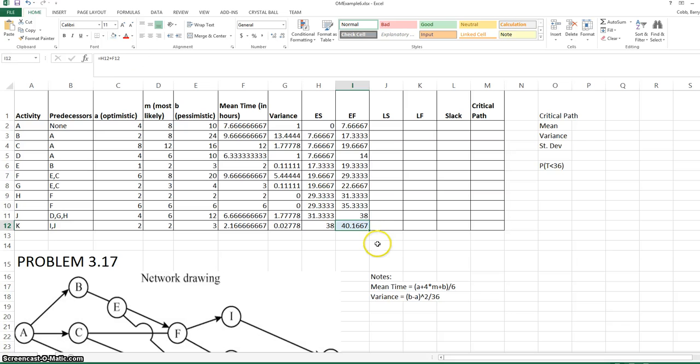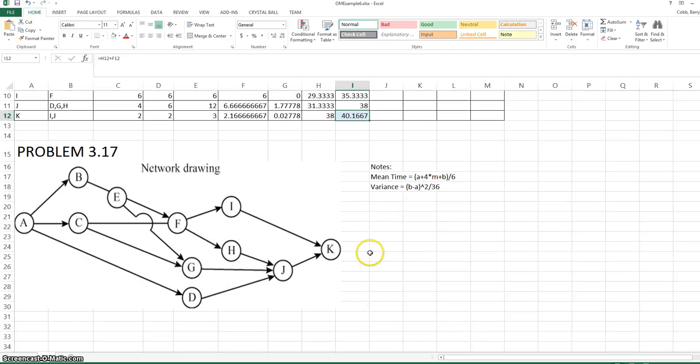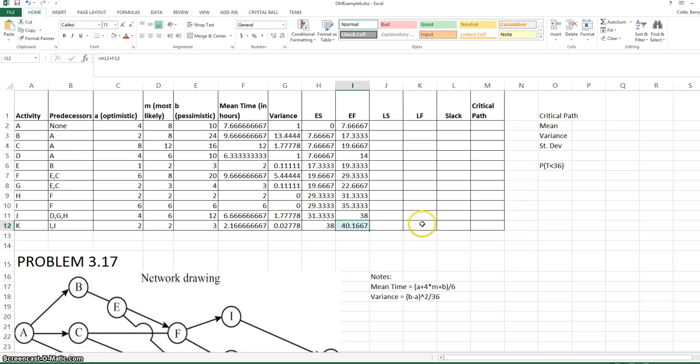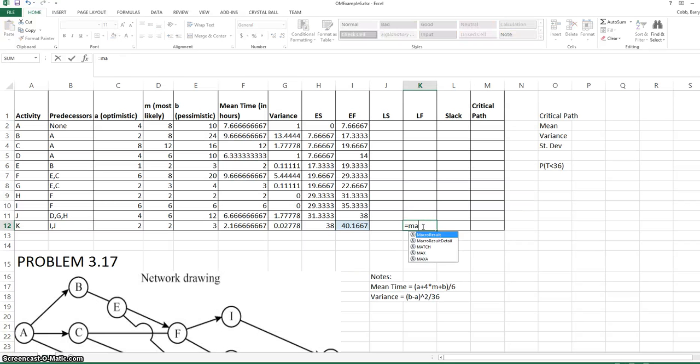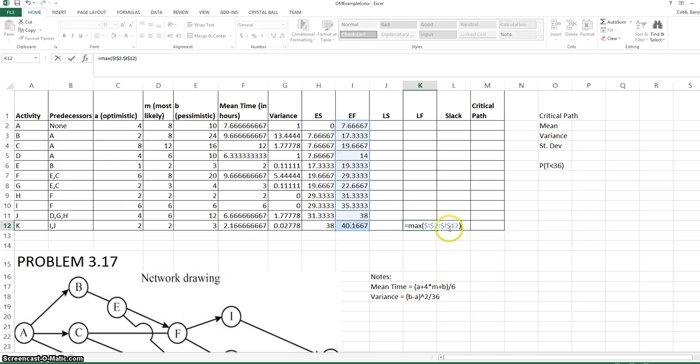So we can see that 40.17 is the early finish time. There's only one completion time activity in this network, and that's K. So the latest finish for K is equal to the maximum of all the early finish times. I put dollar signs in this formula as a habit, but it's not necessary if we're not going to copy this formula to any other cells.